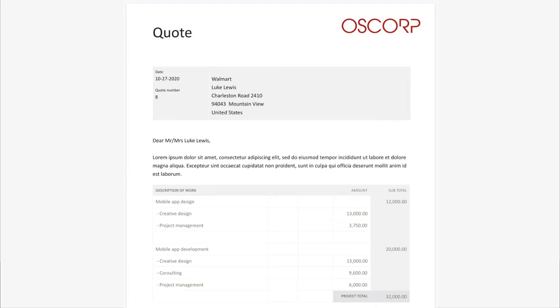The first thing we want to ask ourselves is, what have I agreed to hand over to the client? The description of work section of the quote is a goldmine of information. It answers our question easily. It lists the deliverables as well as the activities. Another source of typical activities that you can use in your projects is your price list. In VOGSY, services and activities are the same thing.